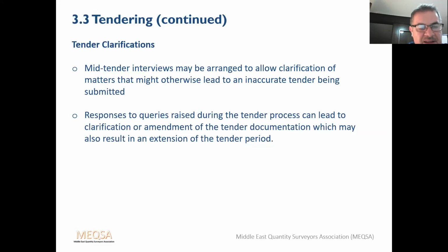It's usually less than is probably required, but it's to focus the contractor, so he doesn't leave it to the last minute. Quite often the client, if asked by the contractors, will extend it by 2 weeks, 3 weeks, just to give them more time to get the full prices in from the subcontractors.